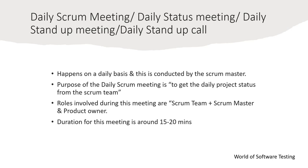Roles involved are the scrum team, scrum master, and product owner. Frequency is daily, and duration is around 15 to 20 minutes — maximum 30 minutes. The scrum master chairs this meeting. Based on the daily stand-up status, the scrum master can prepare burn down and burn up charts, which show how much work is completed versus planned versus pending.